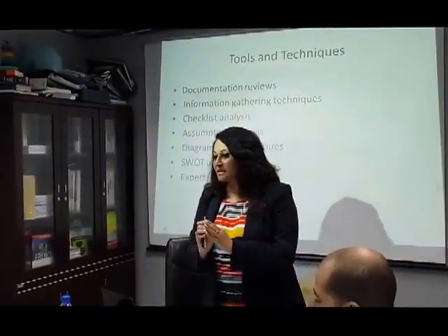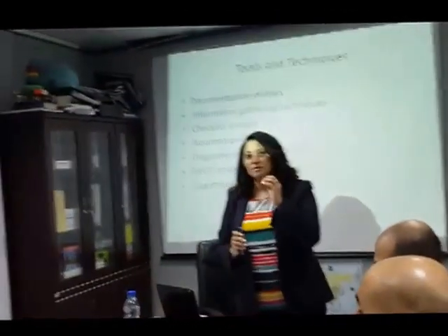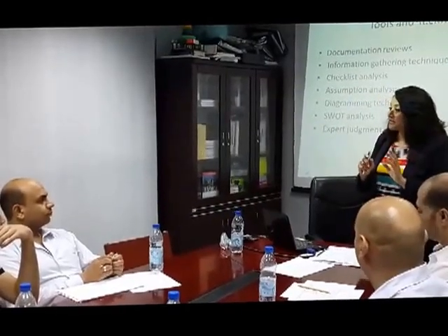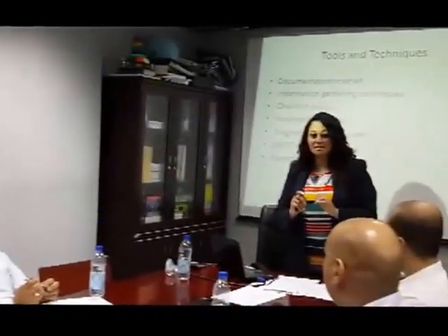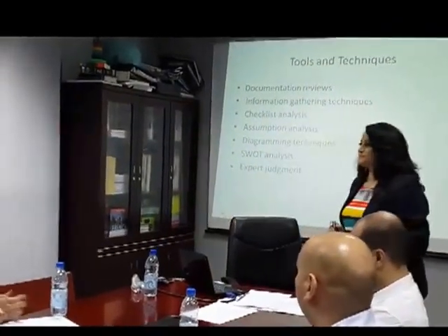Yes, good question. Now, as we're taught here, a risk is an event that could affect the outcome of the project or the objectives of a project, probably cost, timing, quality, etc. And when we talk about risk, we're looking into the future, right? We are trying to predict what events could happen that would affect our project. Now, when this risk happens, it then becomes an issue. So a good project manager does risk identification and analysis in order to avoid having issues.